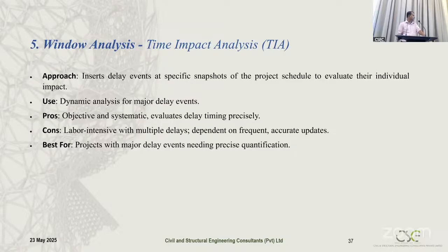The major advantage is that it is an objective and systematic evaluation of delay timing, precisely. The disadvantage is that it is highly labor intensive and depends on the frequency and accuracy of the data. This is good for projects with major delay events needing precise quantification, which means this is the most advanced, recommended, and precise method when analyzing delay events.